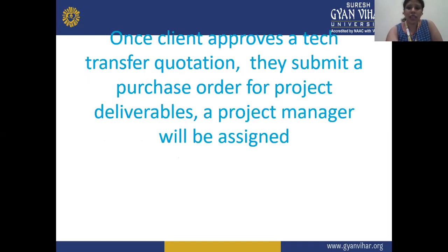Now, once the client approves a technology transfer quotation, they submit a purchase order for project deliverables. A project manager will be assigned. So this is the basic process you need to understand for a smooth start. You submit the transfer quotation, then they prepare and send the purchase order, and they assign a project manager for this.